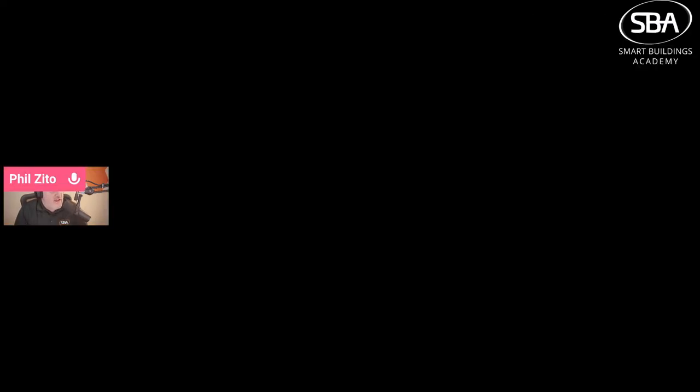Sequence of operations - this is where we're going to do a sanity check of the SOP here versus the SOP in the mechanical drawings. We're going to see if there's some conflict, are there points missing, is there something that's not potentially going to work, and we're going to RFI that. There you have it. I know this went probably a little deeper than you were expecting, but my hope is that it gave you an understanding of this is an MEP set, this is how we do takeoffs.